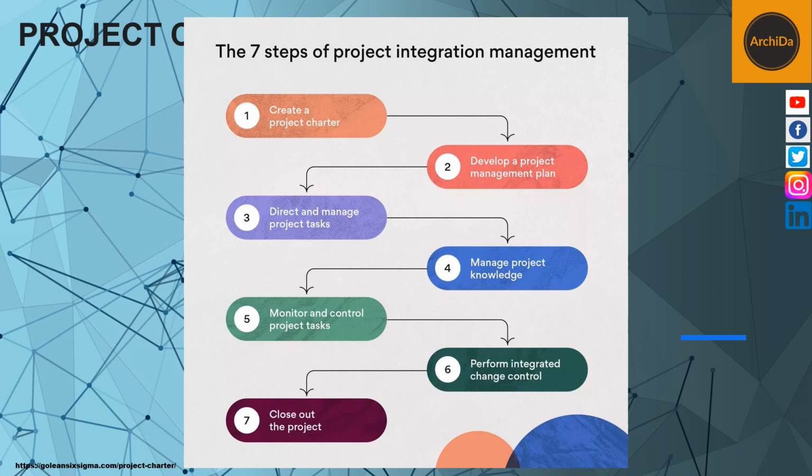For project charter, a project charter is an elevator pitch of your project objectives, project scope, and project responsibilities in order to get approval from key project stakeholders or your users. In the charter, you should provide a short, succinct explanation of the main elements of your project before you get started.